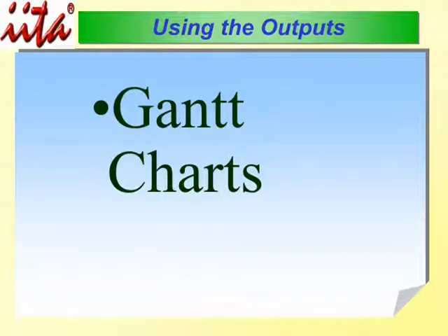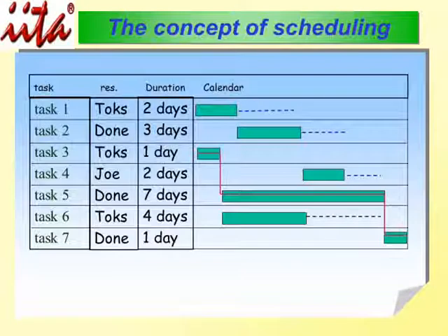Now let's look at the Gantt chart. In the Gantt chart here, we have 7 tasks, 1 to 7, to complete the project. Task 1 takes 2 days, but task 2 depends on the finishing of task 1, while task 3 does not depend on anything. But task 7 depends on task 3 and runs for 7 days.